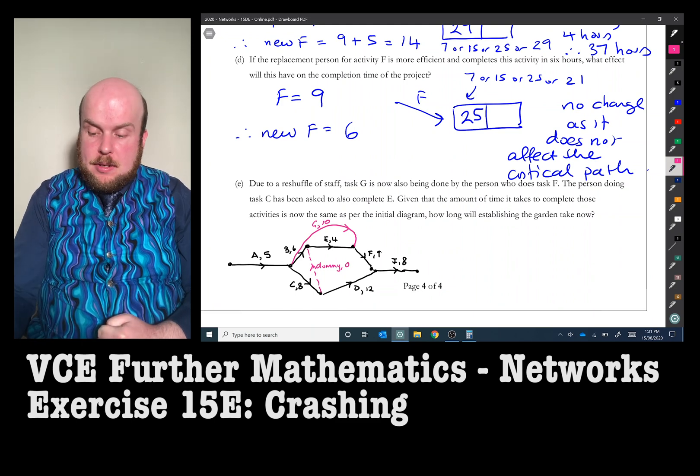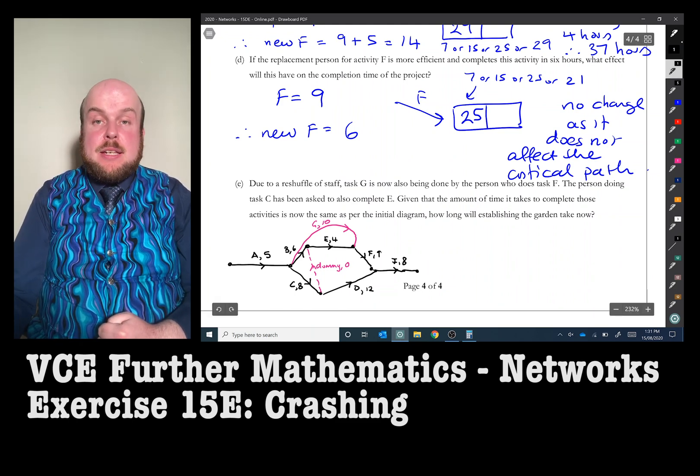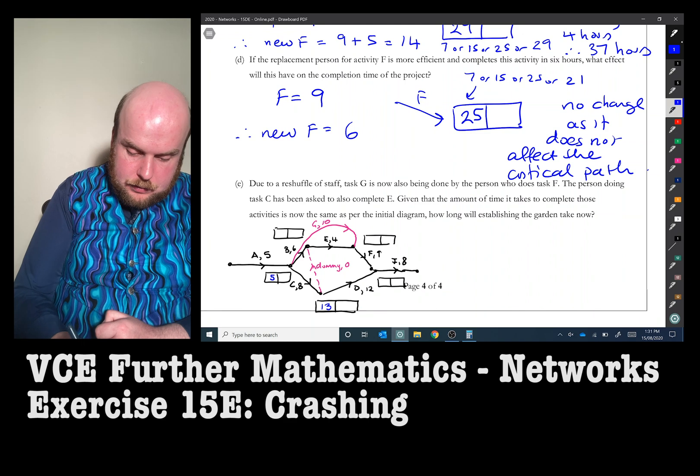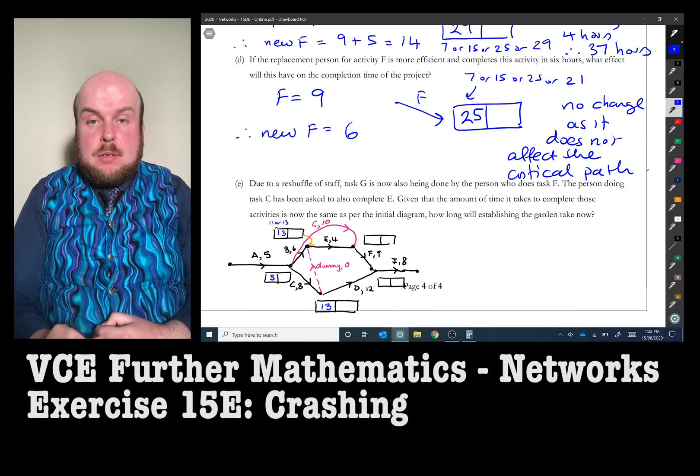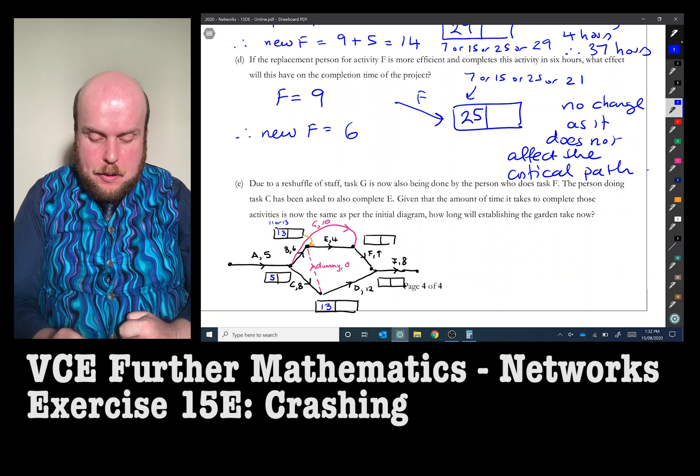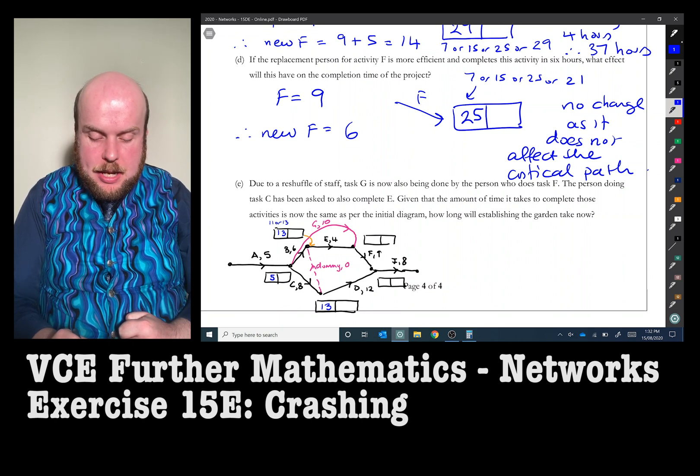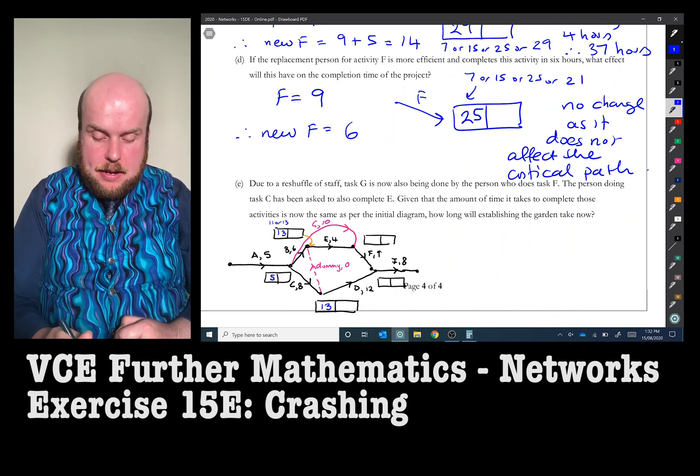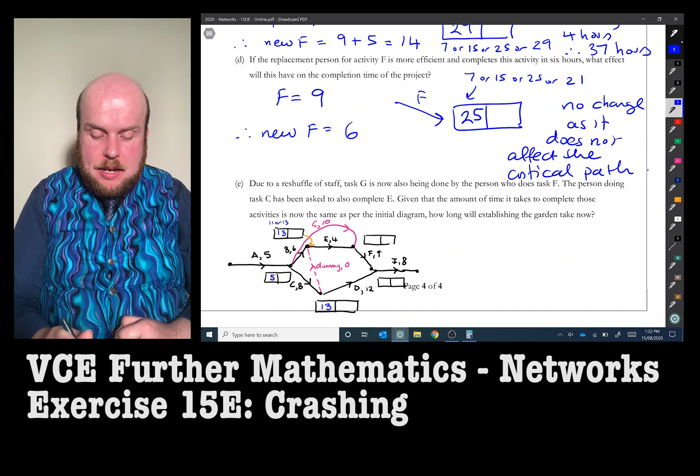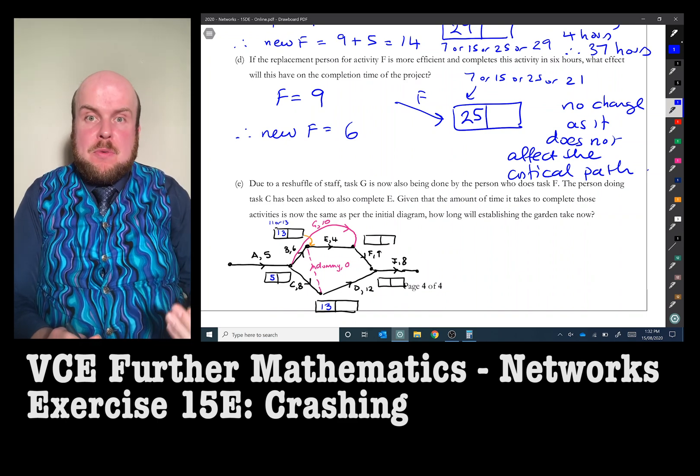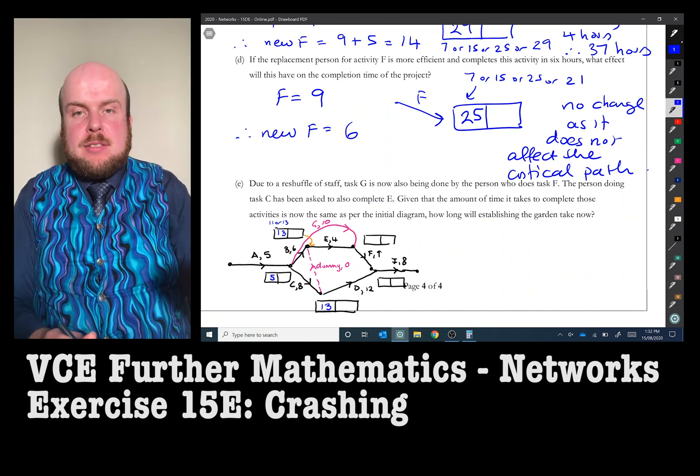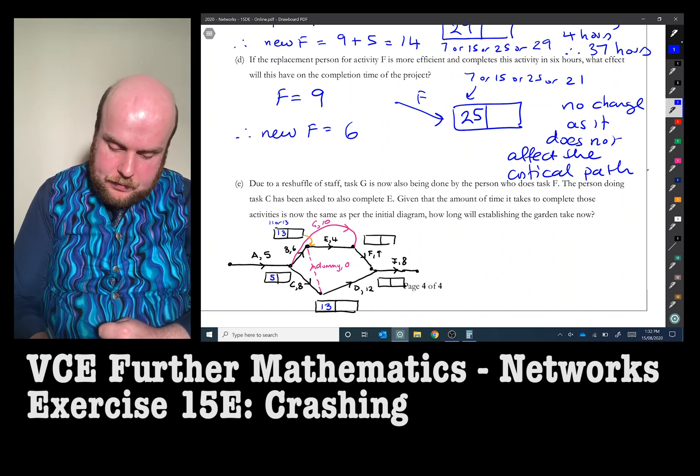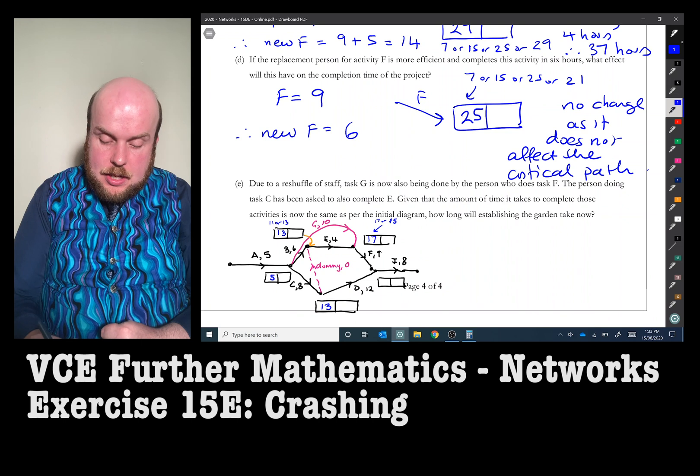So now that we have rewritten this, we can now go and calculate the new times. I'll just pause my working to show you that for activity B, we have the choice of either going five plus six, which is 11, or we can go by the dummy activity or C because that was going to be 13. And we always pick the slowest predecessor or whatever is the biggest number. So that has to now be 13.